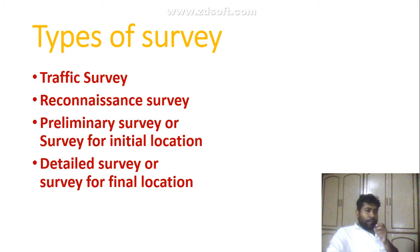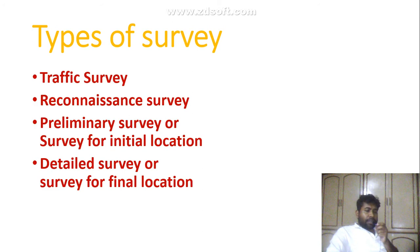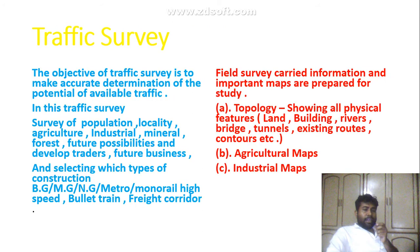Next I will discuss the types of survey — how many types of survey exist in projects related to signaling, railway, and metro. There are four types of survey: first, traffic survey; second, reconnaissance survey; third, preliminary survey, which is a survey of initial locations; and fourth, detail survey, which is a survey for final locations.